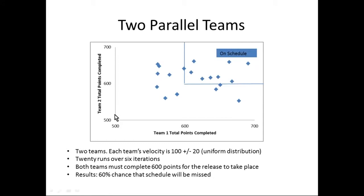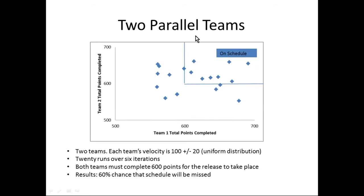Looking at this scatter chart, we're plotting Monte Carlo results for Team 1 and Team 2. On the x-axis is how many points Team 1 actually completes — mostly centered around 600 but sometimes below, sometimes above. Whenever a team is below 600, we've missed the release — that's the cut line. To the right we hit the release; to the left we don't. The same goes for Team 2. The only time we can actually release is in the upper right-hand quadrant, and counting those situations there are only 8 out of 20 — a 40% chance of hitting schedule and a 60% chance of missing it.